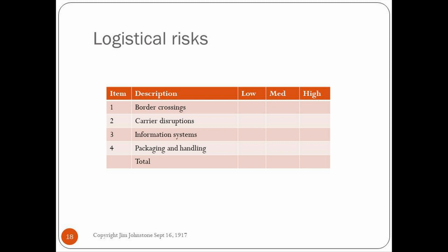So finally, I assigned one of my engineers to shepherd it. And I said, every day, you're going to have a meeting with the 3 sub-tier suppliers. You're going to go over what is the inventory in each part of the pipeline, what were the shipments that day, what were the receipts that day, and what was the yield at every step of the operation. So we started that, and within about 2 weeks, that flow smoothed right out. We started to get a predictable flow into our factory in Austin.